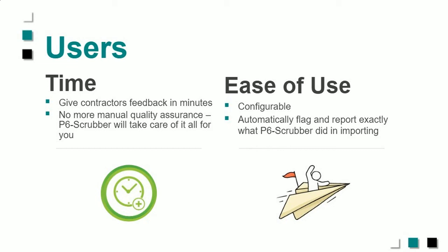Okay. And some of you may know that the security that you need to have around importing is a little scary to give to everyone. So sometimes the importing can be a pinch point. And the fact that it automatically flags what's coming in so you can see it, and you can do all the nice remapping, really makes it easy to use and repeatable. So those definitions are now repeatable. That's very important. So you can have a more senior person help set up the definitions, and then maybe a more junior person can actually run them because they've got that framework already put together. So that's a big thing.